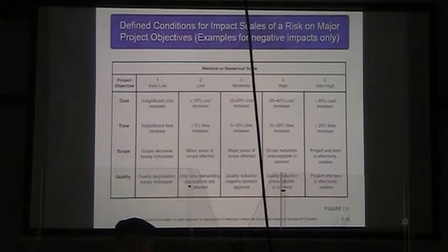With quality, very low is quality degradation is barely noticeable. Low would be only very demanding applications are affected. Moderate, quality reduction requires sponsor approval.